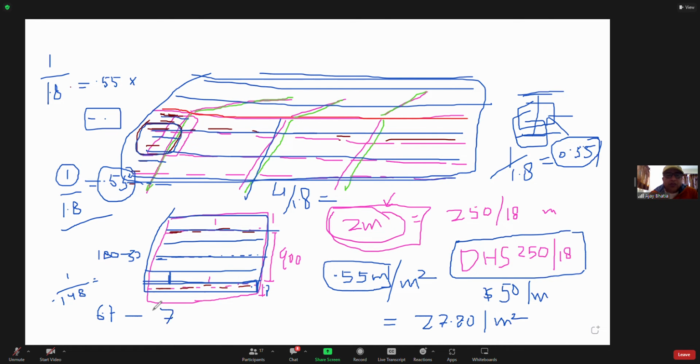You don't add 1 over there. You do 6 plus 1, because there are 6 full lengths and then 1 length which is probably not going the full exposure, maybe half exposure, but you still have to buy the full length. So you go 6 plus 1, 7. You do not say it is 6.7, so I'll take it as 7 and then plus 1. That is wrong.